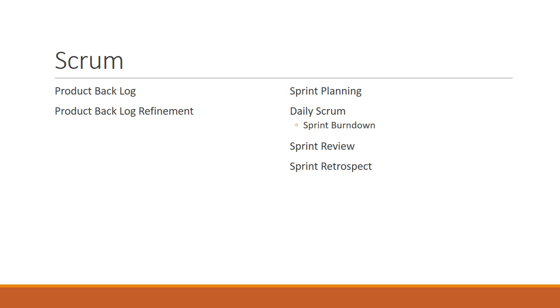But at the end of the sprint review meeting, anything that isn't completed can be moved to the next sprint, which typically happens, or it can go back into the sprint backlog and be reprioritized by the product owner, who is responsible for prioritizing and maintaining that list of backlog items.